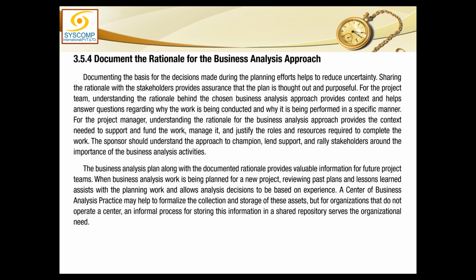The business analysis plan along with the documented rationale provides valuable information for future project teams. When business analysis work is being planned for a new project, reviewing past plans and lessons learned assists with the planning work and allows analysis decisions to be based on experience. A center of business analysis practice may help to formalize the collection and storage of these assets, but for organizations that do not operate a center, an information process for storing this information in a shared repository serves the organizational need.